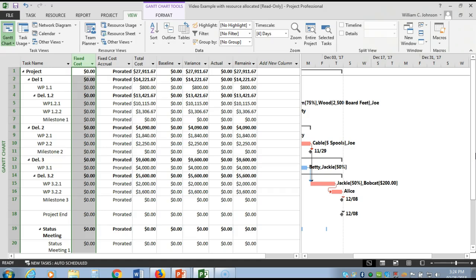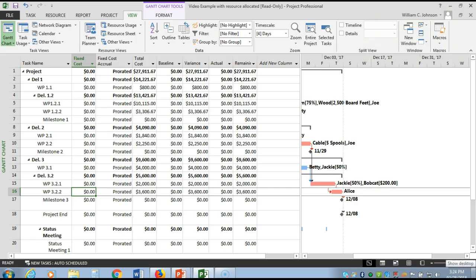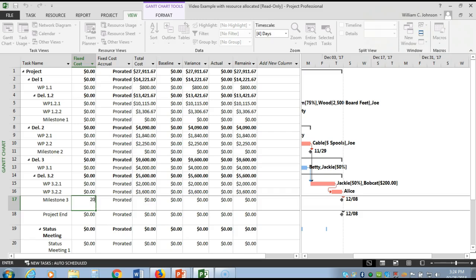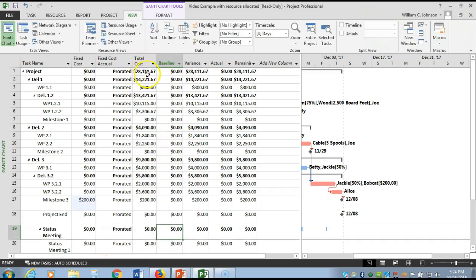And you can add it in here in one of those areas, in one of the last ones here or one of the first ones. Let's say that you are being charged $200 for insurance. So add $200 here. And notice that the total up here will change when you click away. And it did. Went to $2,800.11.